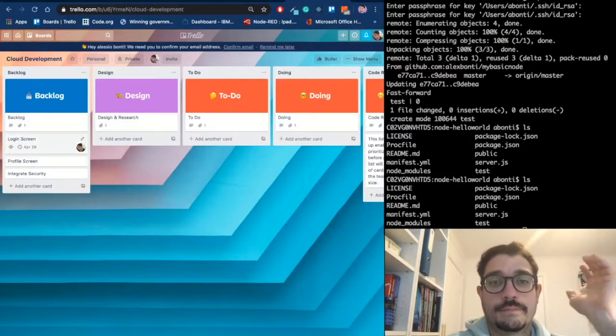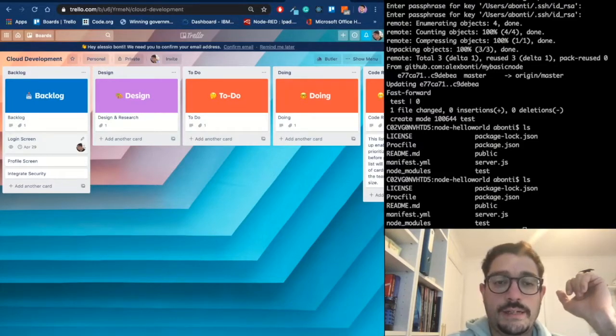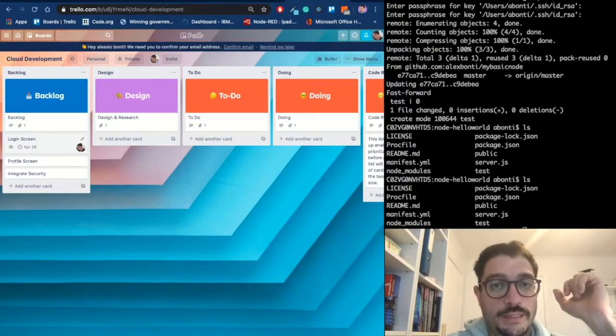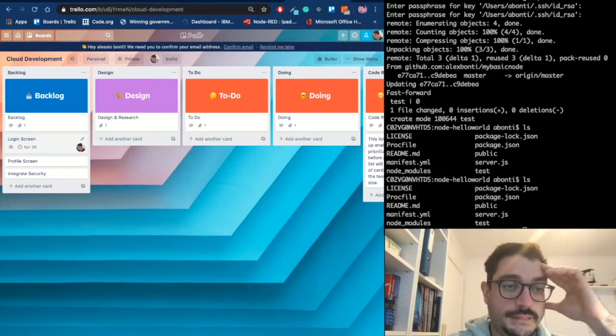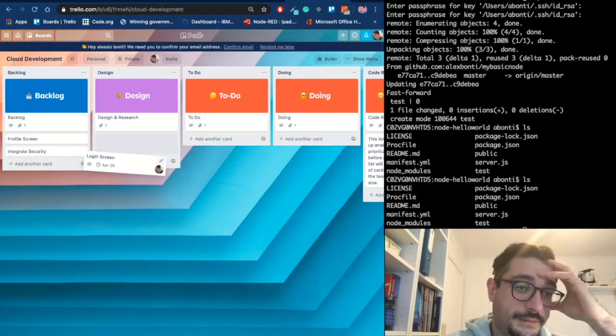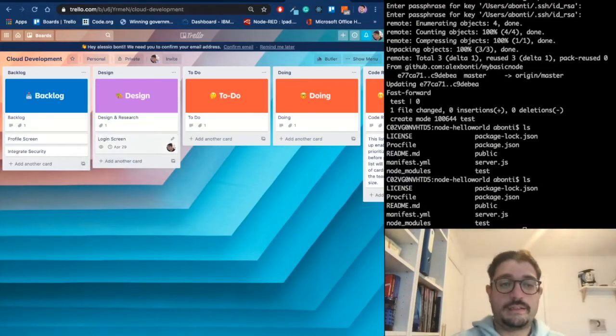Okay, so that's mine. Now, the one thing that should not ever happen, any of these given columns should never ever have your name twice on that same column. So let's see. So, okay, first iteration, I'm gonna go in this. Okay, so I need to design this.